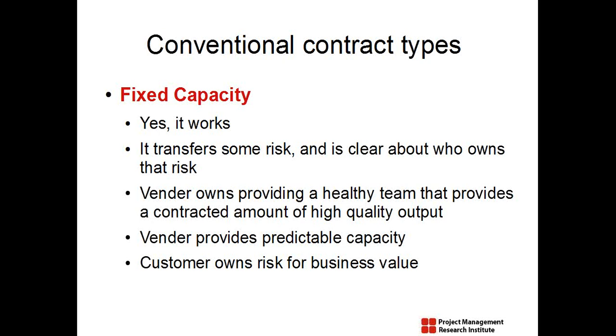So the capacity and the quality risk is shared by the vendor, but then he doesn't own the project management and schedule related risk here. So that is one disadvantage for the customer.